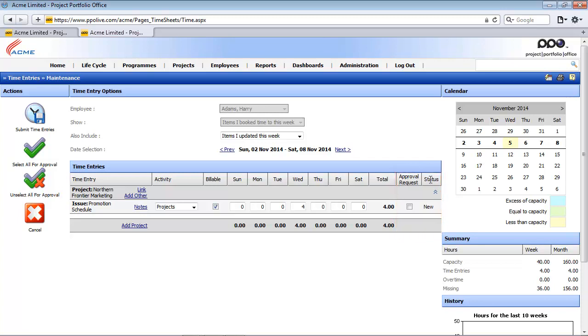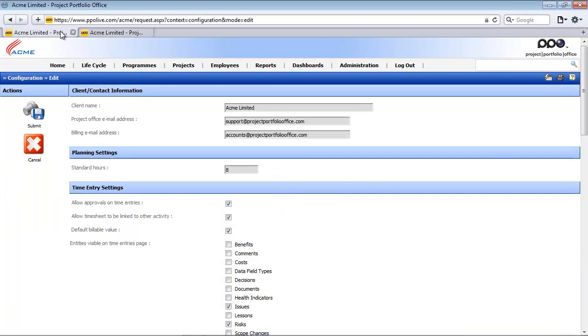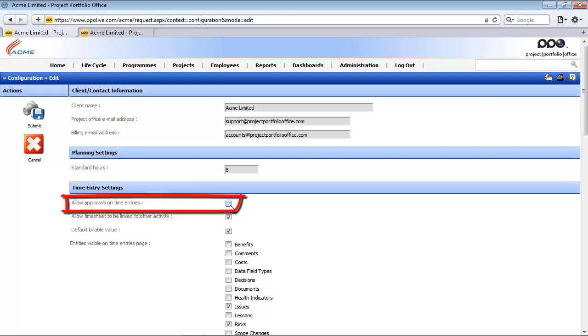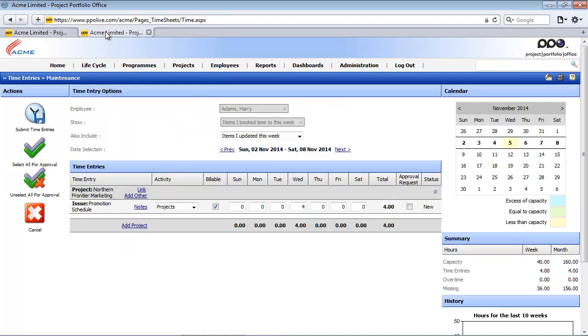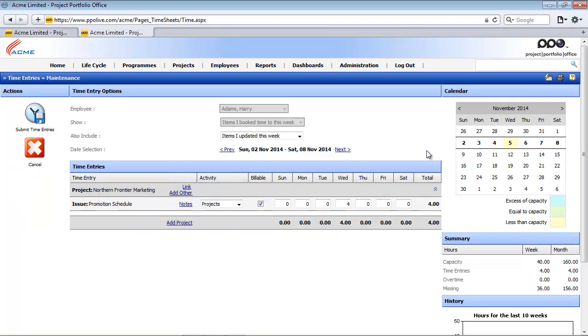They will now appear on the time entries maintenance page because here within my system configuration I have said that I want approvals on my time entries. If I uncheck this and I submit and I return back to my second tab and I simply refresh the page, you will notice that the two last columns relating to the approval have now disappeared.